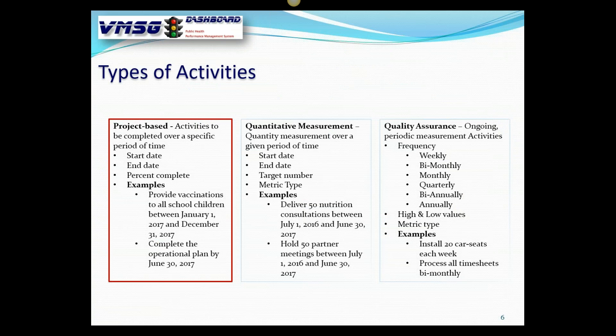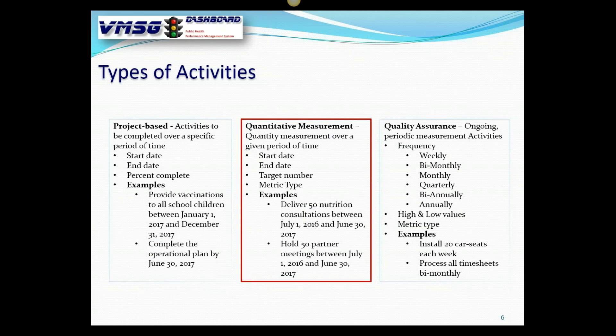There are three types of activities. Number one is the simple project-based activity. Number two is a QM activity — Quantitative Measurement — where you have a finite number to measure against. For example, a WIC clinic tasked with 50 nutrition consultations during the fiscal year. When the email goes to the WIC clinic manager asking how many consultations were done last month, they enter a number — say 5. It adds to prior months, so maybe 20 plus 5 divided by 50 says we're halfway done, and you can determine whether you're ahead of or behind schedule.